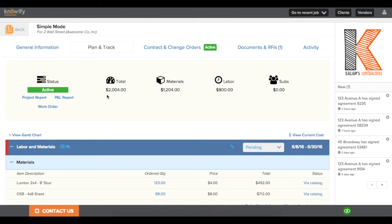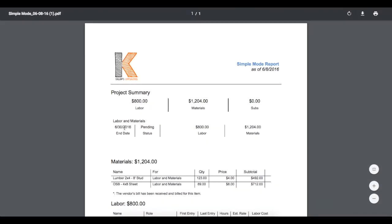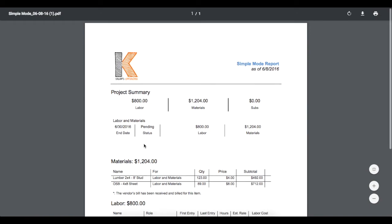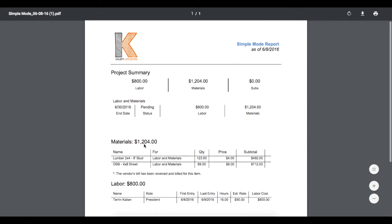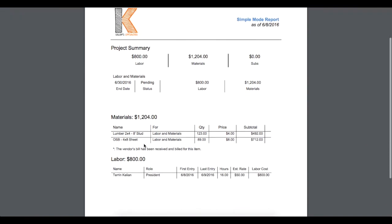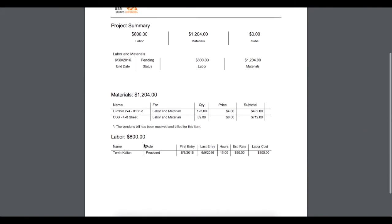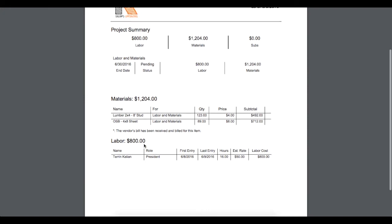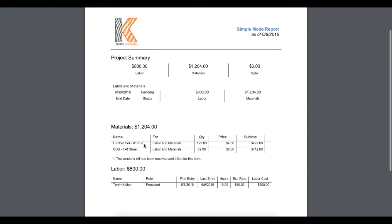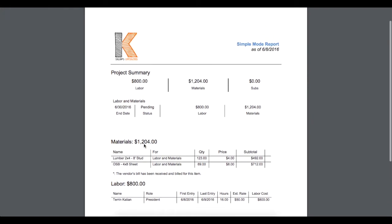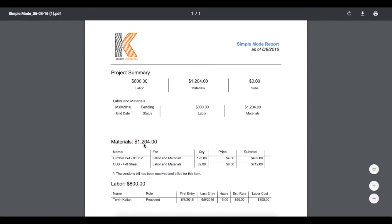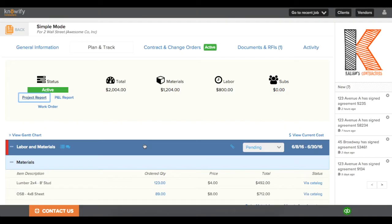You'll see that this job is showing me just a total cost to this, broken down to Materials and Labor, and I can actually print out a project report which will give me a breakdown of all of my costs on the jobs thus far. You'll see that it's just a simple PDF that shows you all the different materials that you've purchased and all the different Labor entries that you logged.